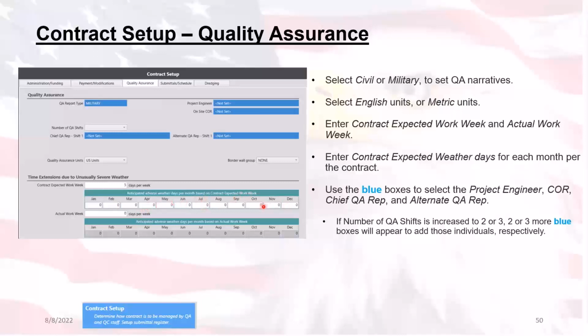This is just per the terms of the contract. Now, it's not to say that these are absolute. It's just a prediction of agreed numbers on days of each month that might cause a weather delay so that RMS can accurately calculate certain modules.